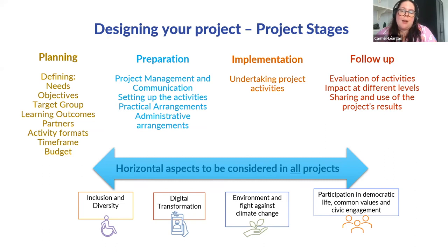You might have, for example, 3 or 4 different work packages, which will all need a preparation phase as well. So you need to think of these stages as a little bit multifaceted. You need to see it as the overall project, but then whatever work package, what are the stages needed there as well. In terms of implementation, that is where your activities are taking place.